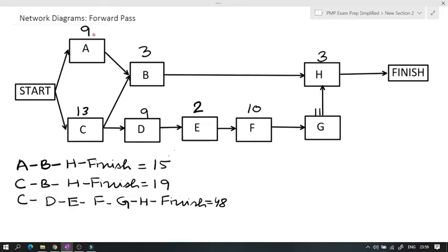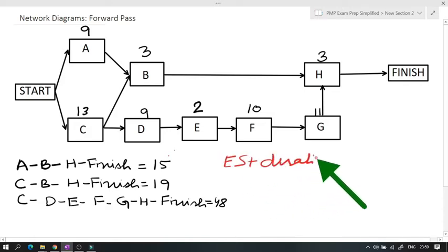So now that we know what the critical path is, the next thing we need to do is what we call the forward pass. You would start out with the first activity here and move to the right. There are a couple of different rules to remember when you do the forward pass. You take the early start plus duration minus 1 as the early finish date.